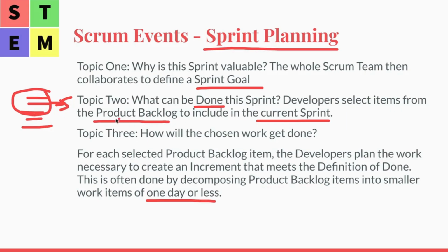We pick the items into the sprint, and then we need to make tasks from the list if the product backlog item itself takes more than 1 day. Some items could take like 3 days, so in this case you need to separate that task into at least 3 subtasks, so that it can be tracked within the sprint.